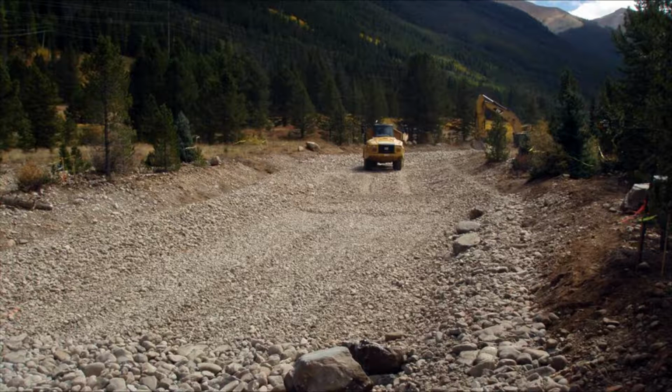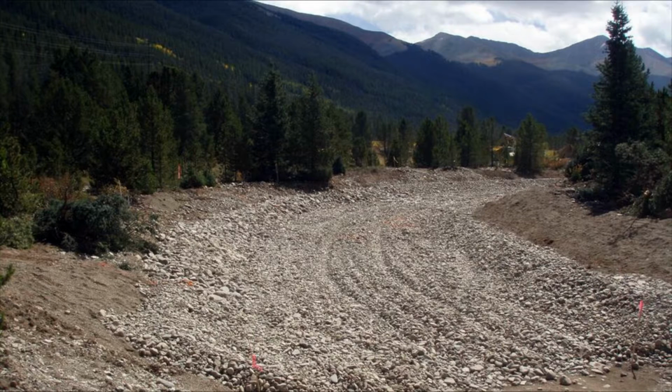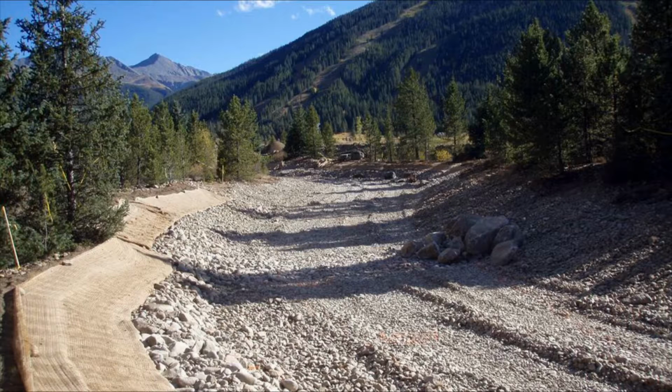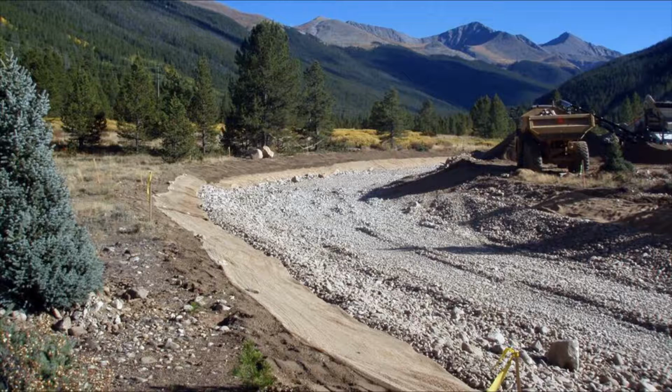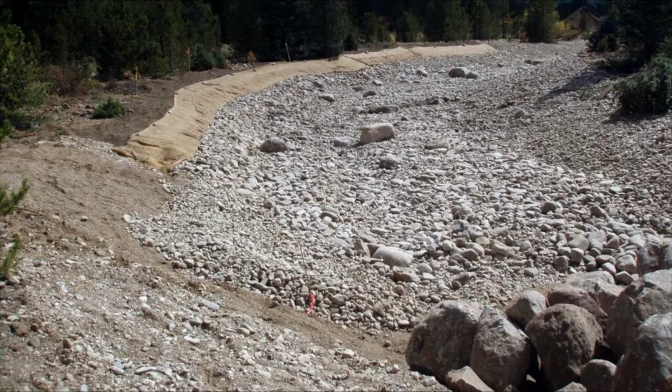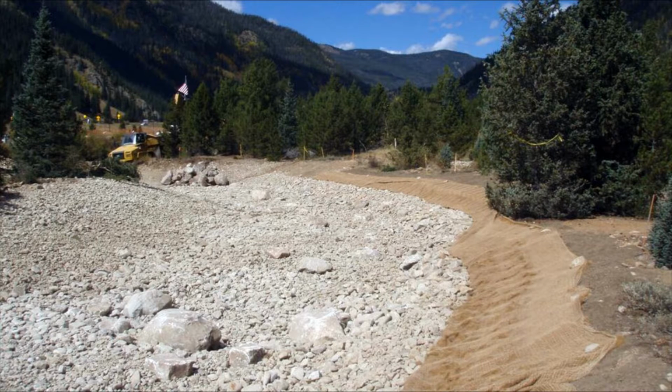This revegetation effort is important to the overall success of the project because the vegetation provides stability to the banks and riparian area. Construction activities again went well. There were some issues in one area with utilities crossing the stream, but they were solved with only minor delays. This time construction was more visible to users of the new bike path that was constructed in 2013. The stream restoration and the bike path upgrade and extension had always been planned as part of the same overall restoration of the area. They had different construction sequences because of fundraising issues. Still, it was encouraging to see the bicyclists stop and watch the stream restoration activities during Phase 2.